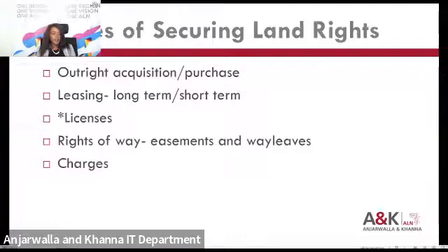Then one other method which I mentioned at the beginning was rights of way. So there'll be easements and way-leaves, and normally easements and way-leaves are suitable when the project company does not require exclusive use of that property. So for instance, if there needs to be access to a facility, but that access is also used by other parties, whether they're private individuals or public entities, then it might be more suitable for the project company to secure those land rights by way of a registered easement or way-leave, so that the other people who are interested in that parcel of land are also able to utilize the parcel of land.